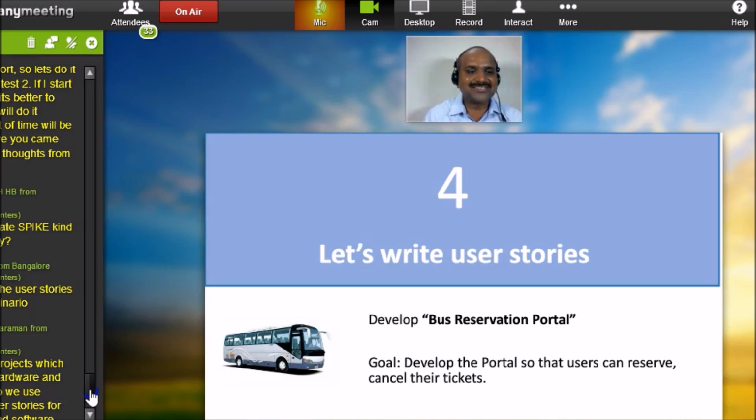Okay, Srinivas, I wanted to tell you, while describing user stories, whenever people use the word "and," that is a potential indicator to you so that you can split there. Okay, there is another concept that we are going to talk about as definition of ready at the end of this presentation, that may also give you some insights. And also we are going to talk about a case study here that may also give you some insights.